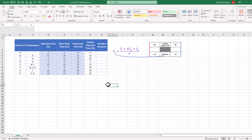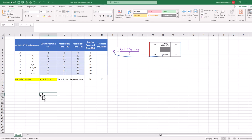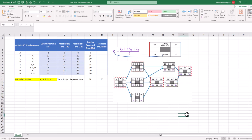The formula is then duplicated for the rest of project activities to find TE for all. We should then draw the CPM network based on the precedence logic. For all activities, the expected time or TE will be the duration. As described in previous videos, forward pass is used to find project duration. For this project, total expected time or mean completion time is equal to 70 days. Then backward pass identifies the chain of critical activities, which are A, B, F, G, H. The schematic view of the network can be seen on the right side of the screen. This concludes the first step in implementing PERT in Excel.